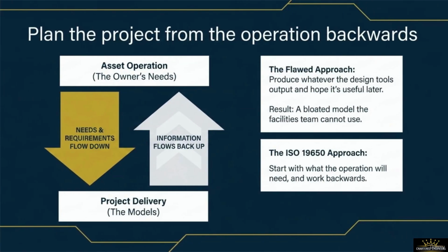Let's contrast 2 fundamentally opposed approaches to project data planning to understand how ISO 19650 changes our engineering workflow. The traditional flawed approach allows the delivery team to produce whatever information their design software tools naturally output, hoping it will somehow be useful to the client later. This lack of planning results in a bloated, unsearchable model that the facility management team cannot utilize.